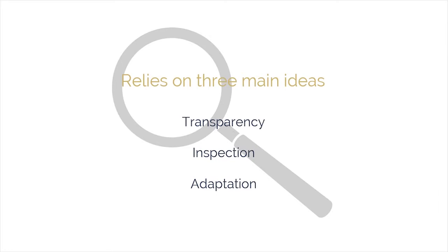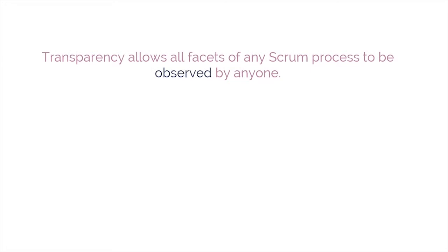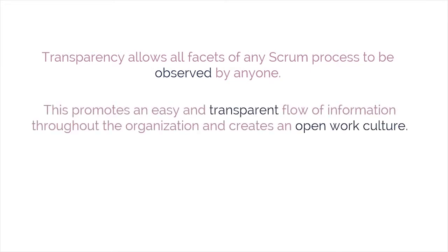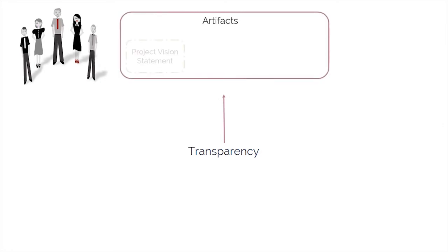Let's start with the first idea: transparency. Transparency allows all facets of any Scrum process to be observed by anyone. This promotes an easy and transparent flow of information throughout the organization and creates an open work culture. In Scrum, transparency is provided by openly sharing the project vision statement, which can be viewed by all stakeholders and the Scrum team.